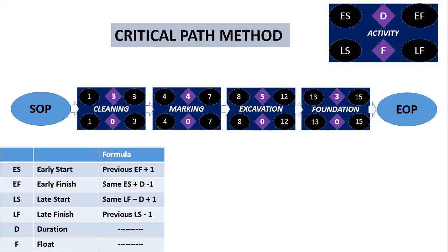Okay, then the early finish of the same task, cleaning. What's the formula for early finish? The same early start, that is the early start of the same activity. What is the early start of cleaning? 1, right? 1 plus the duration of cleaning, which is 3. 1 plus 3 is 4, minus 1 comes to 3.